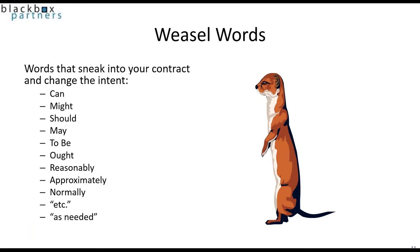Weasel words are words that sneak into your contract and change the intent. These are words like can, might, should, may, to be, ought, reasonably, approximately, normally, etc., as needed. These words are like weasels — they're thin words that slip into your contract and wind up ruining the intent. None of these words have very strong meanings like will and shall. It may seem boring to write statements of work in contracts that only use will and shall, but it is much better than having weasel words that have snuck into your contract, changing the intent, or words that could be reinterpreted without clarity.